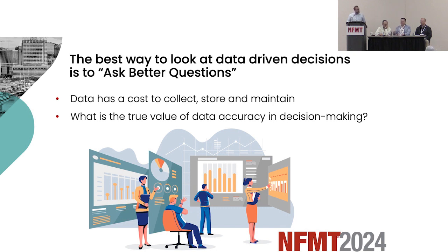But conversely, what's not in the system? Ask the negative question. Hey, we see everything that's in there, but I'm not seeing anything with this project ID attached to it. How do I link those two? Hey, this project has 0 assets. Hunt down your PM and say, where are we at with the asset transfer or the data migration?